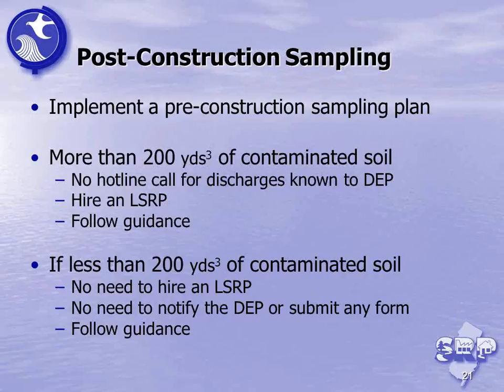If it is discovered during the pre-construction sampling, I know many utilities would look at the information very closely, and if there was so much gross contamination there, they may either decide to redesign or even reroute the project. So it's very important at this stage as another decision point on how you would approach the project.